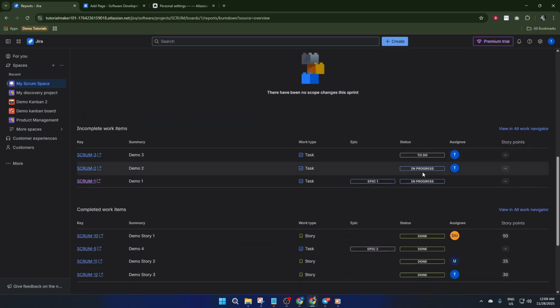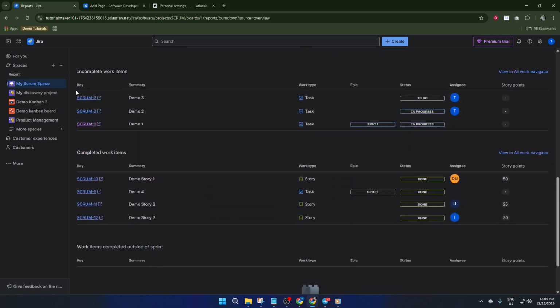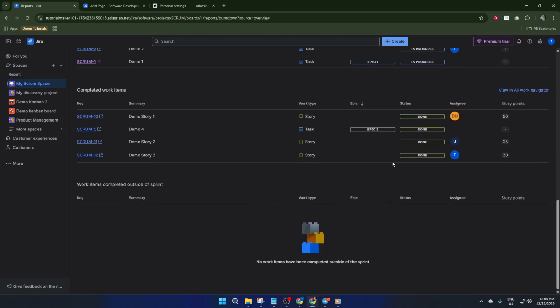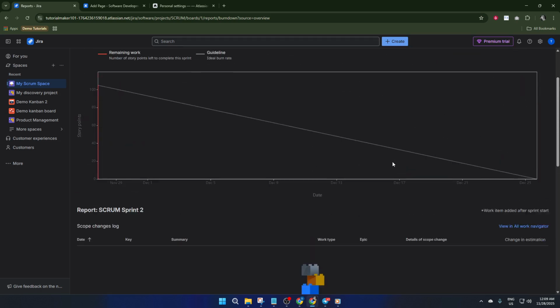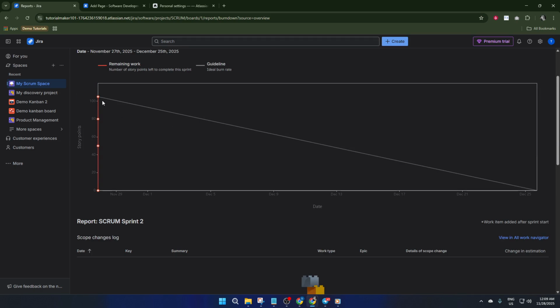Now, let's use that information to boost productivity. One of the most powerful aspects of a live burndown chart is that it gives real-time feedback to the team. If you notice you're drifting below the ideal line, maybe halfway through the sprint, you can pause and make tactical adjustments. Maybe you'll need to shuffle priorities, break down a stubborn task, or even just ask for a little help. The earlier you spot a slip, the easier it is to correct direction.